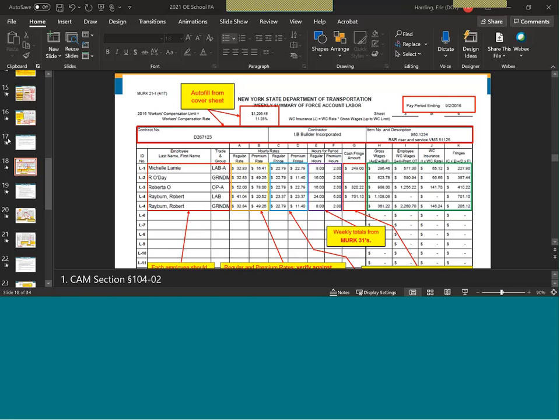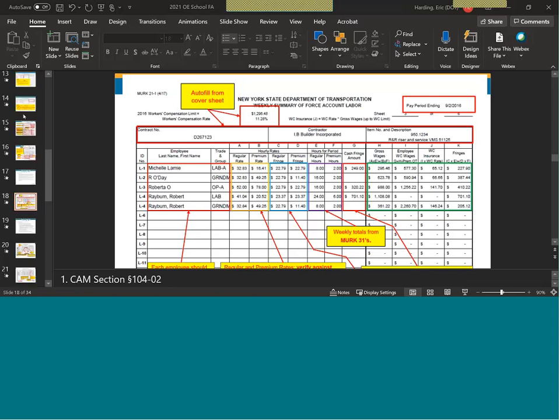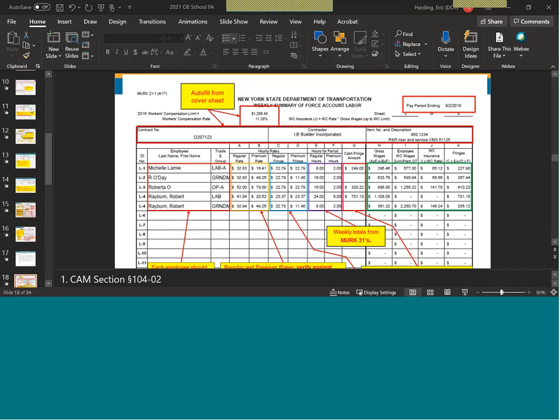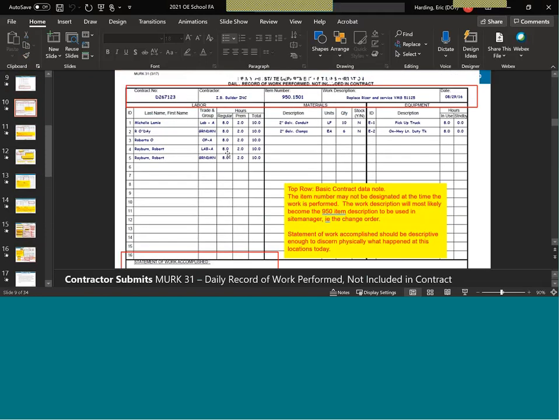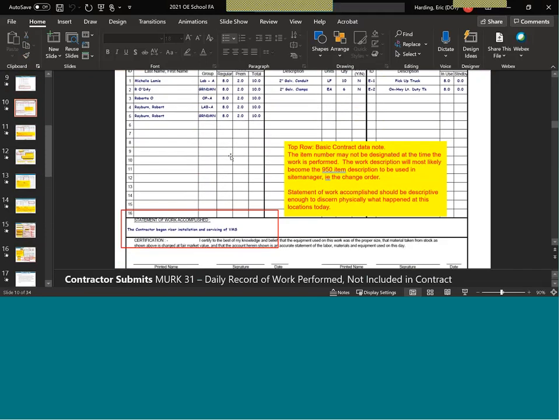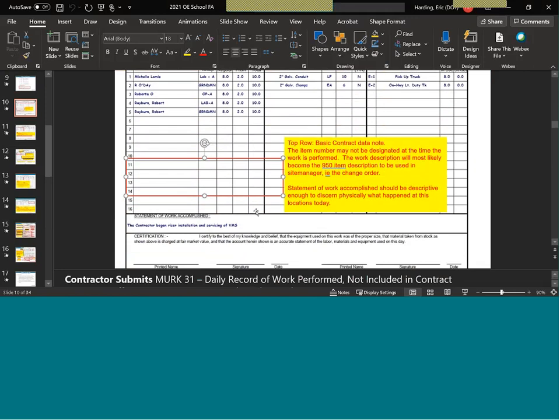Again, you have to make that determination as to how you're going to account for this type of work. It's extra, but not easily definable from what your contract work included. Just because you have a contract item doesn't mean you actually have to use it if there's a change in the scope of that item of work, or the site of that item of work, etc.